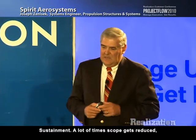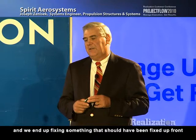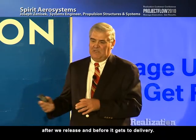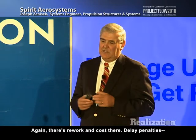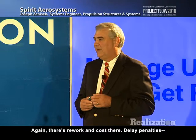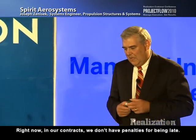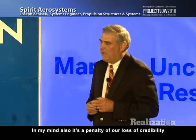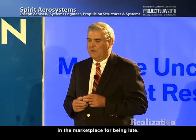Sustainment, a lot of times scope gets reduced, and we end up fixing something that should have been fixed up front after we release and before it gets to delivery. So again, there's rework and cost there. Delay penalties. Right now in our contracts, we don't have penalties for being late. We do have penalties on scope for being overweight or something along those lines. And in my mind also, it's a penalty of our loss of credibility in the marketplace for being late.